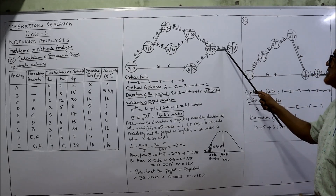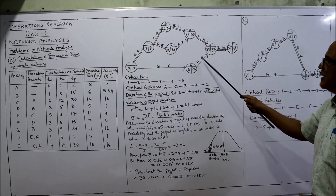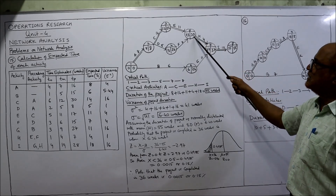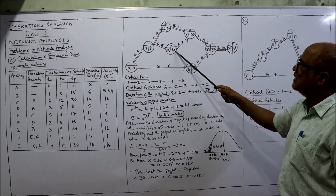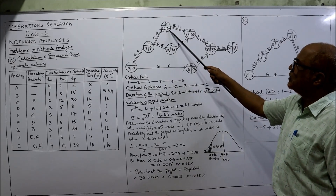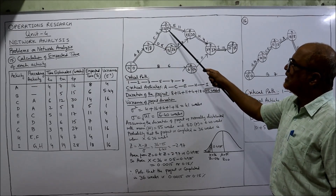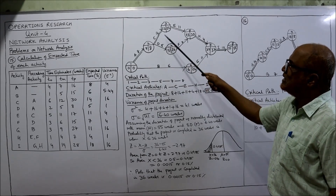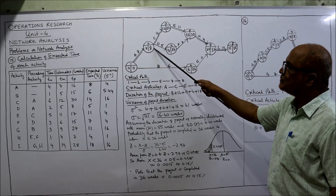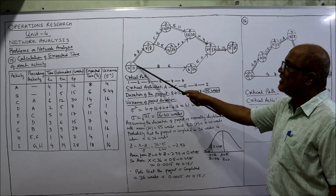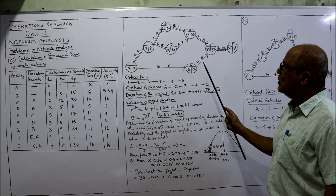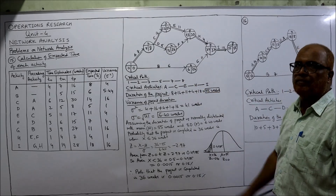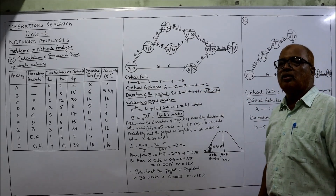Now we move to the backward pass to calculate LFT (Latest Finish Time). Starting from the last event: 55 − 18 = 37. Then 37 − 11 = 26. Similarly, 37 − 4 = 33. Then 33 − 7 = 26 and 33 − 11 = 22. Two arrows bursting: take the minimum of (22 − 14 = 8) and (26 − 5 = 21) — 8 is less. Two arrows bursting: minimum of (8 − 8 = 0) and (26 − 6 = 20) — 0 is less. All EST and LFT values are now obtained.